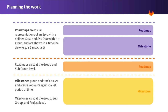Milestones are designed to organize and track issues and merge requests against a set period of time. The idea behind a milestone is that it's created with a start date and an end date. If you're coming from an agile environment, you would call this a sprint.